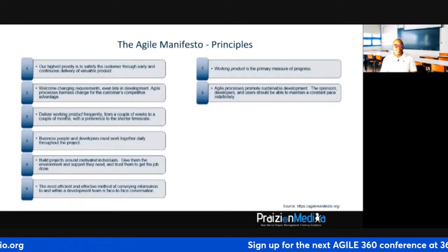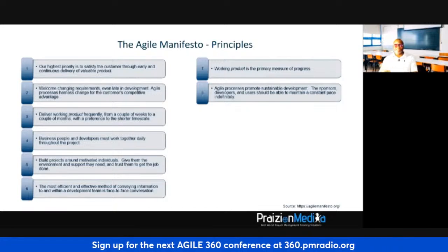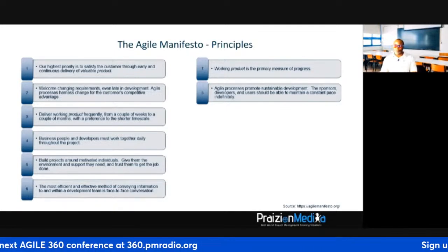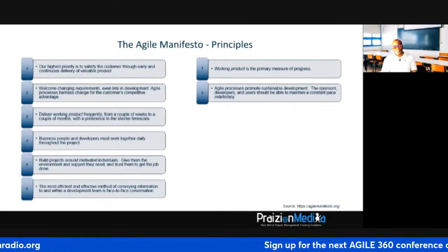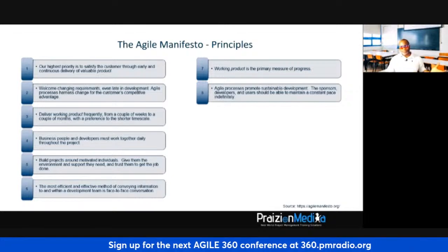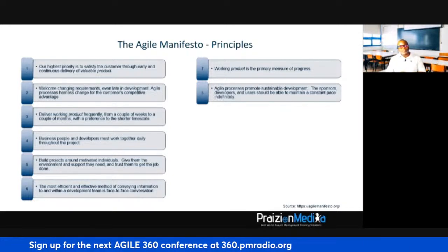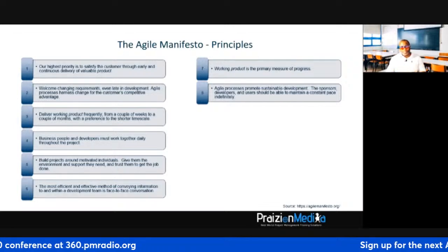That's not being Agile. Another thing that we don't do in the world of Agile is just add people randomly. Oh, we got this commitment, let's throw more people. No, we don't do that. The reason is we want to keep our metrics pure and pristine so that when we're using this data to plan for the future, it's not warped. Because if you add more people artificially in order to get one piece done, then it becomes warped.